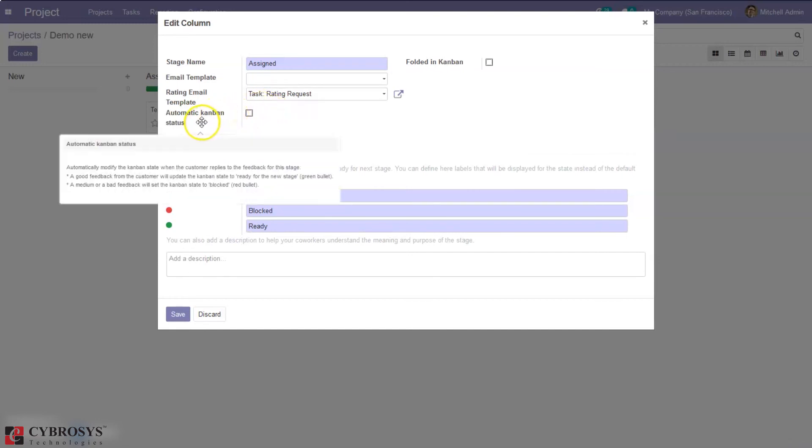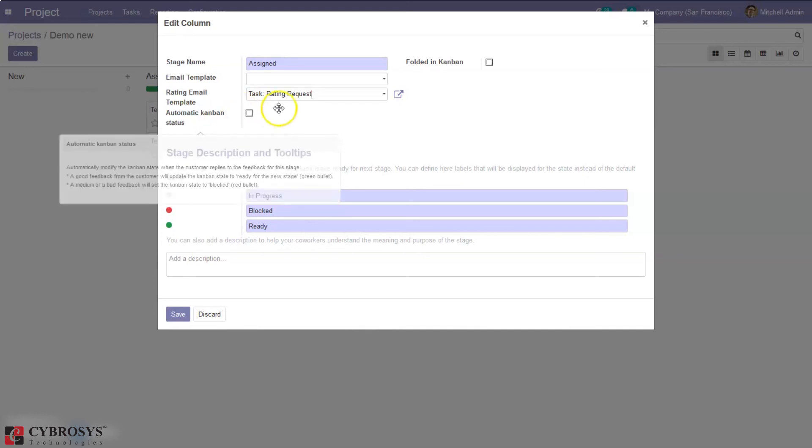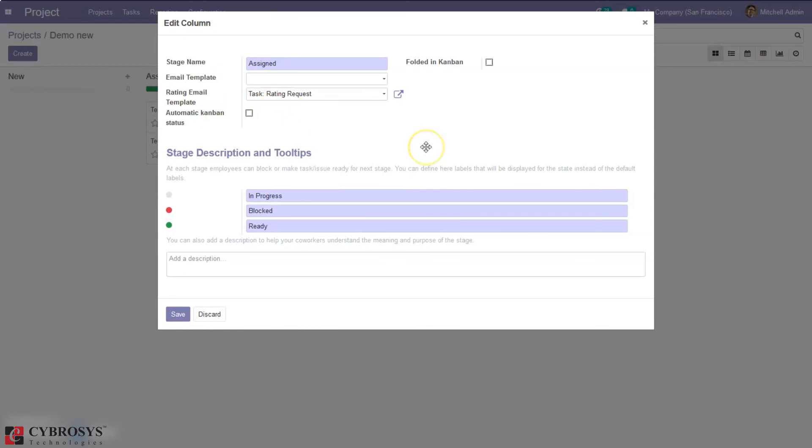So here we can set rating request email template and it is also possible for automatic, that is to give automatic Kanban status. So automatically you can modify the Kanban state when the customer replies to feedback on the stage. So if it is good feedback from the customer then the state will be updated to ready for next stage. And if it is bad or medium then it will automatically be set as blocked which means a red color that we have seen before.